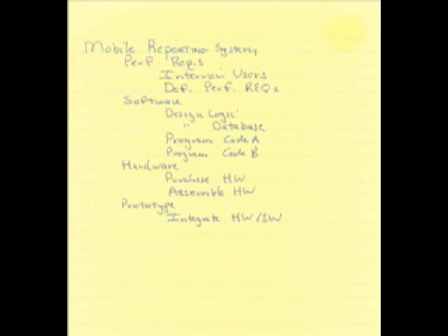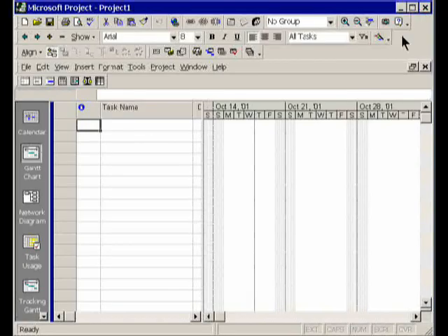Before we enter Microsoft Project, we need to sketch out in advance what the work breakdown structure is going to look like. And that's what you have before you on this sheet. A simple outline with 3 levels: the project itself, the 4 deliverables, and then the activities required to accomplish each of those deliverables. Now we're ready to work within the software.